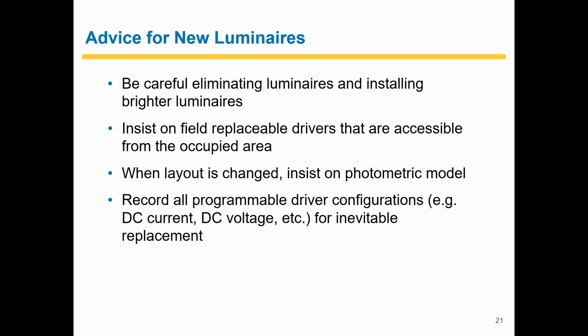If you're using any programmable drivers, which is an increasing factor I'm seeing in new LED products, you want to record the DC current and DC supply voltage, because both of those can tend to be adjustable. That way, when there is an inevitable burnout, you're able to program it and provision that driver appropriately. That might be included in the luminaire submittals.